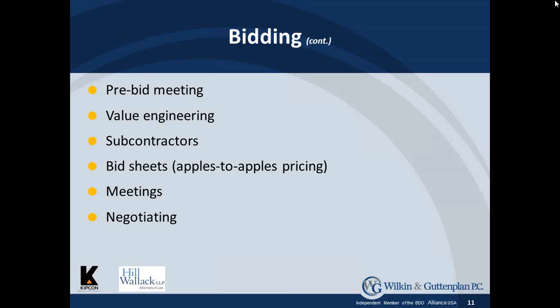How many subcontractors are included in the job? Always want to know about subcontractors because you want to make sure the subcontractors provide insurance and you get proof of payment as the overall contractor is getting paid.